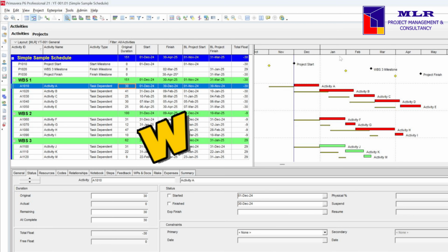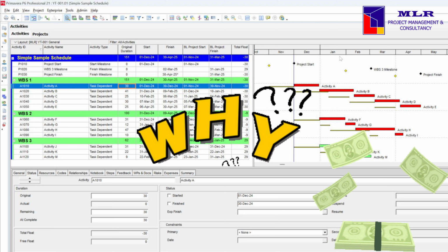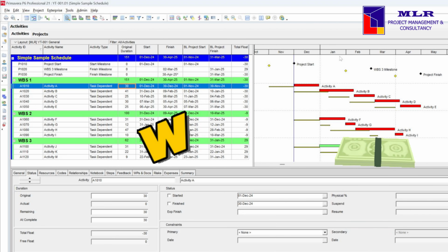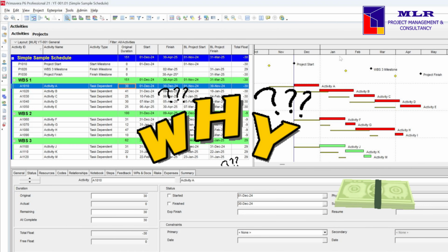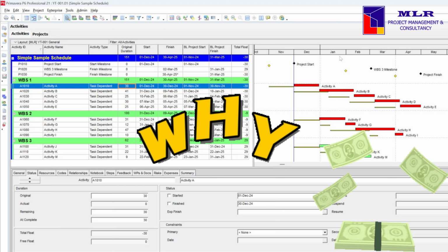What I mean by that, they normally, and in most cases, have commercial implications. Achieving or not achieving these milestones on time may render the contractor to gain financial incentives or pay liquidated damages or both. That's why it's important to know the critical activities that will lead to completing these interim milestones by the contract agreement dates.